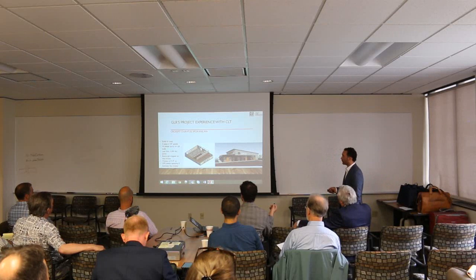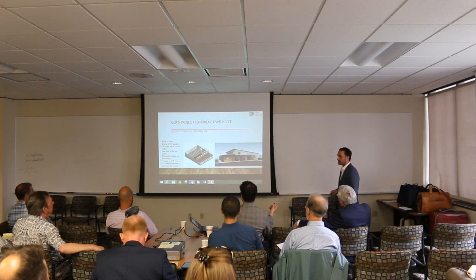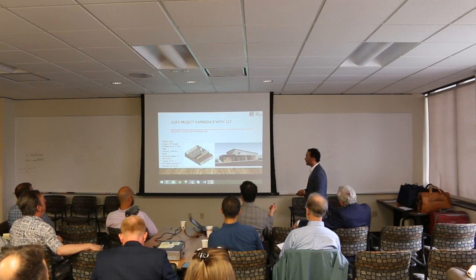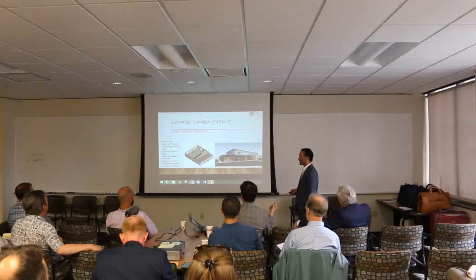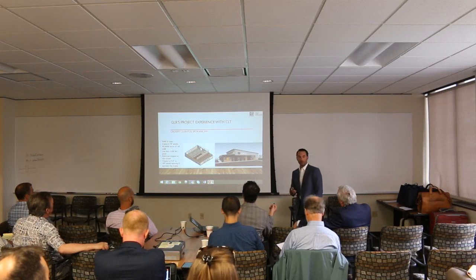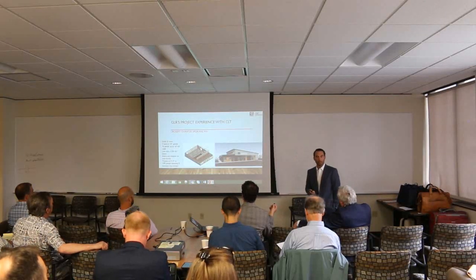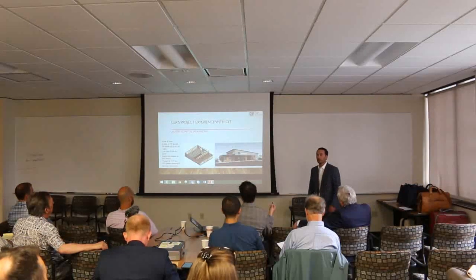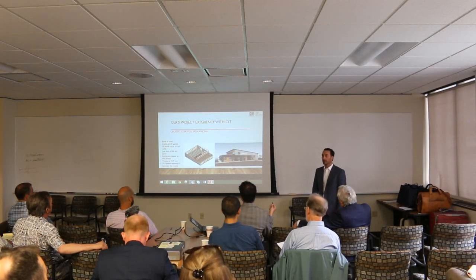And then what we did for the roof is we kind of treated it like you would a steel building, so to speak. We opened up the gym part. We did trusses 8 feet on center, used SIP panels to span those. And the whole theory there was that the contractor was able to do this with a very small crew. As he would say, just a couple of gorillas up there muscling things around and some fairly unskilled labor, and did it very quickly.